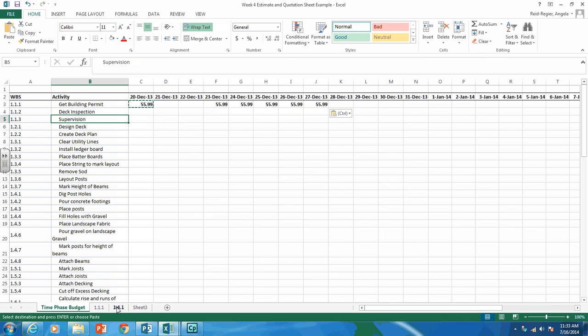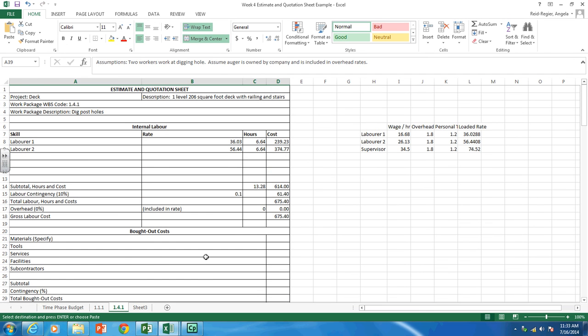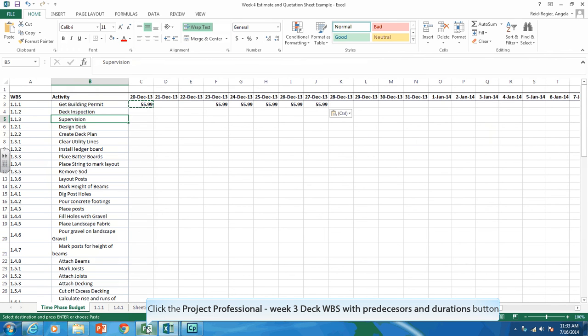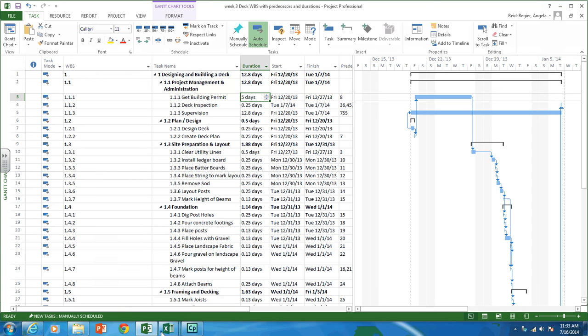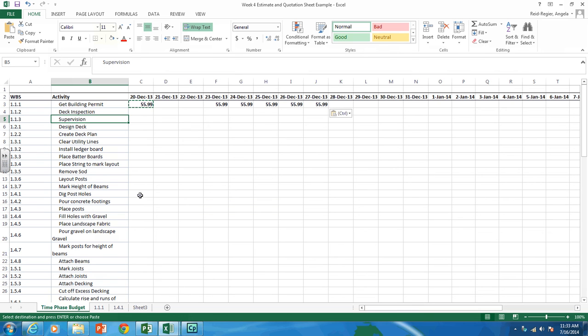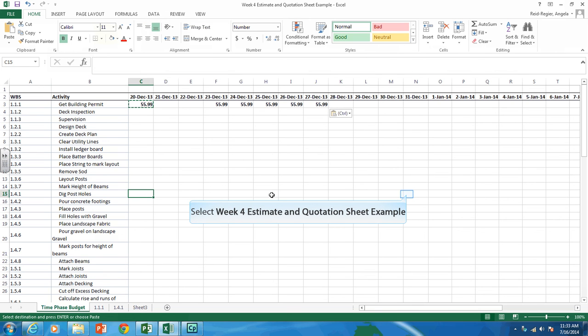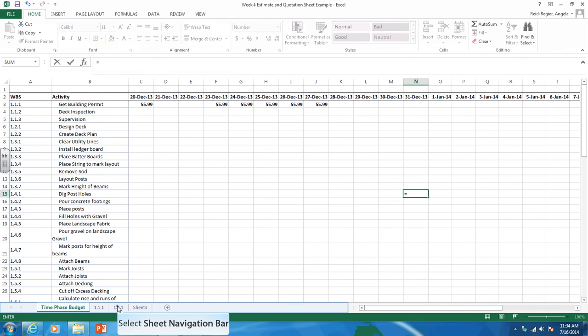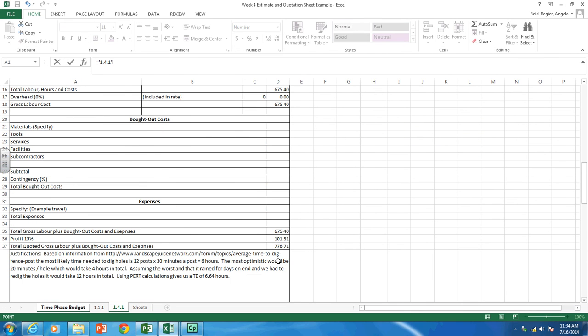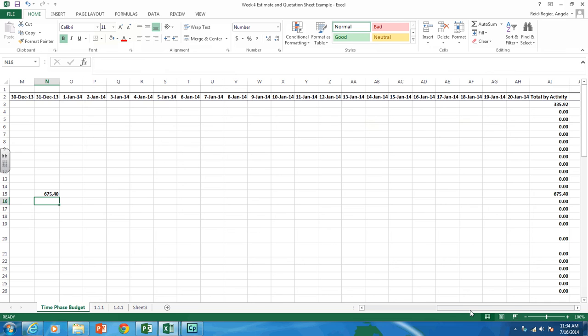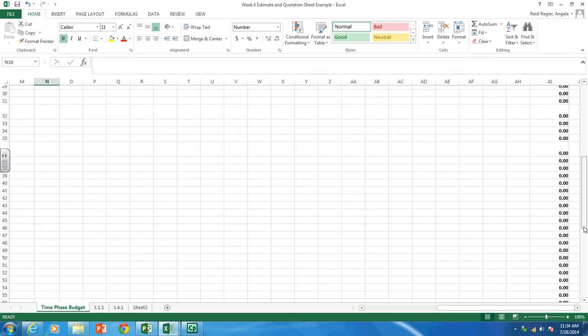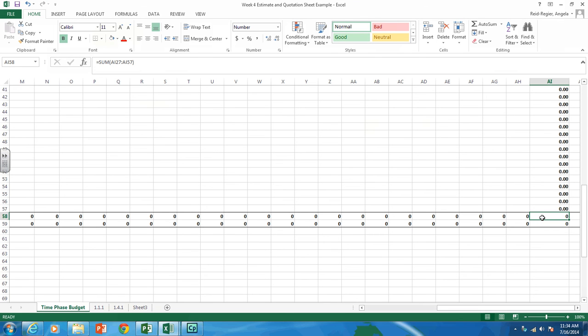So let's try one more. So 1.4.1, which is dig post holes. So if we look at our schedule, 1.4.1 starts on December 31st and finishes on December 31st. So that's easy. We just need that spread over that one day. So let's go to 1.4.1, and it's on December 31st. So let's go to December 31st. We'll hit the equal sign, go to that estimate and quotation sheet, grab the costs, and hit enter. So we don't have to divide it or spread it out over any other but one day. And as you can see, my formulas on the side total it up. And then it also totals it up on the bottom as well.